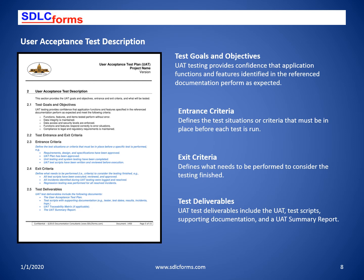The test goals include that all functions, features, and items tested perform without error. Data integrity is maintained and functions and features respond correctly to error situations. Entrance criteria examples are that the requirements, design data, specifications, and the UAT plan have been approved prior to execution. Exit criteria examples are that all test scripts have been executed, reviewed, and approved, and all incidences identified were logged and resolved.